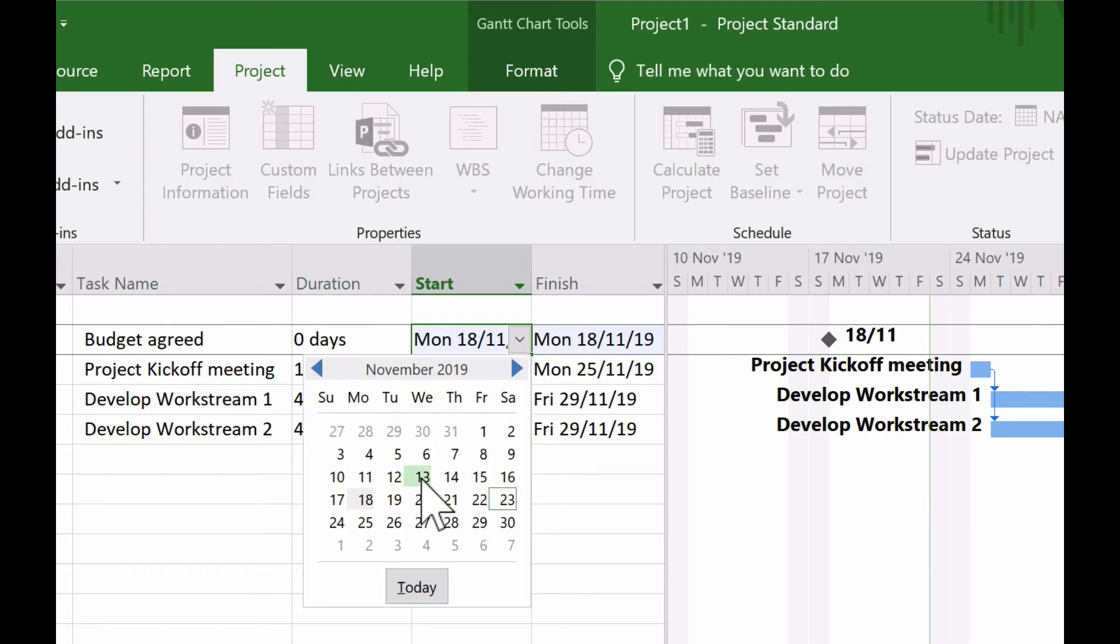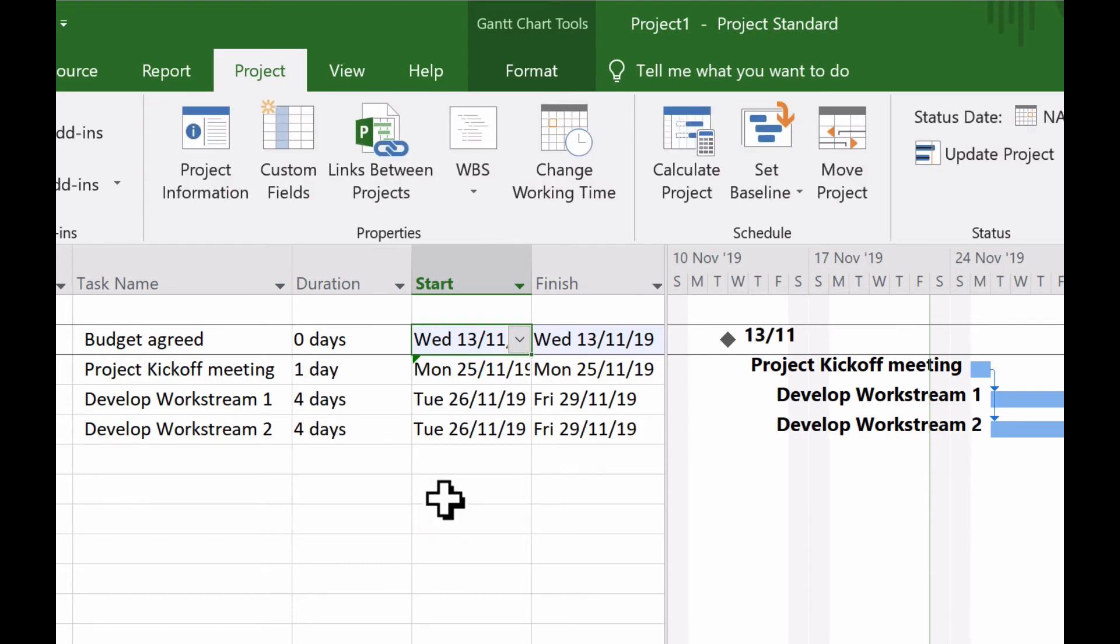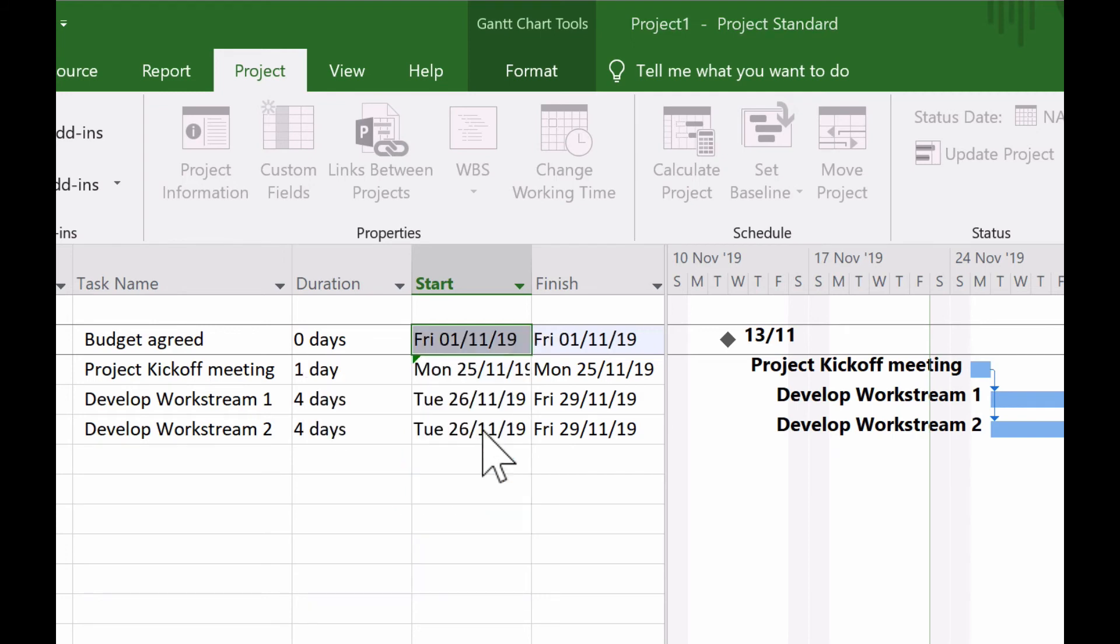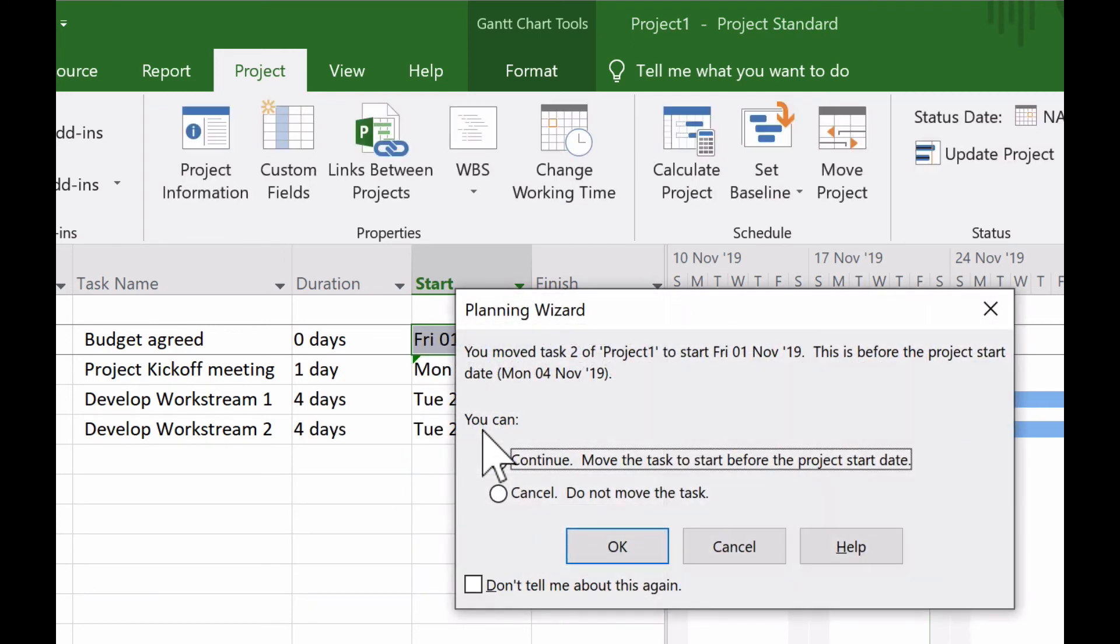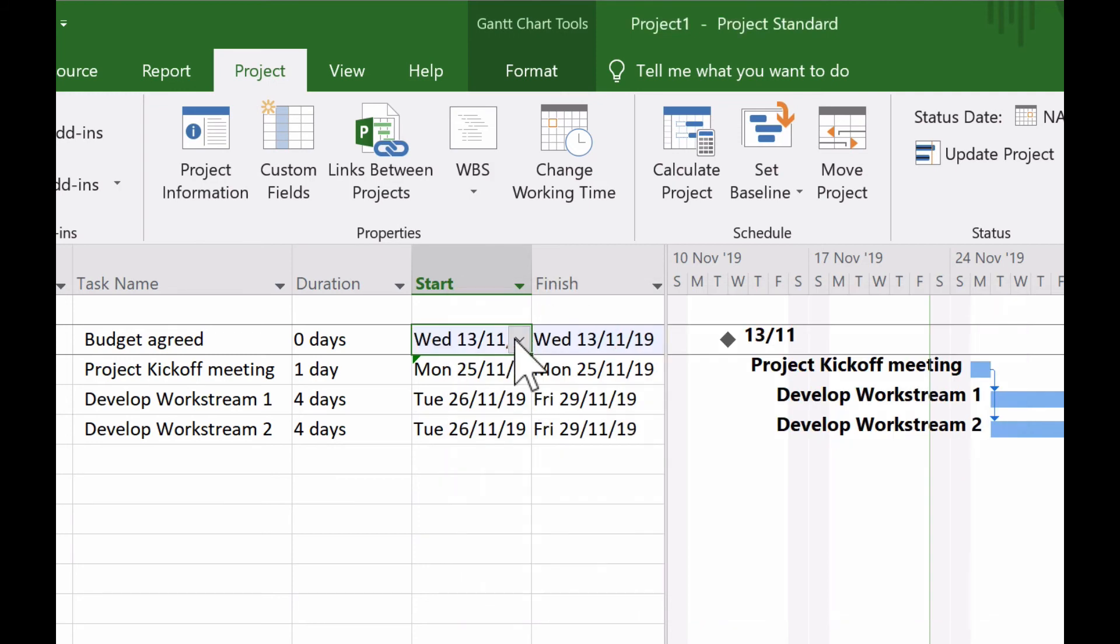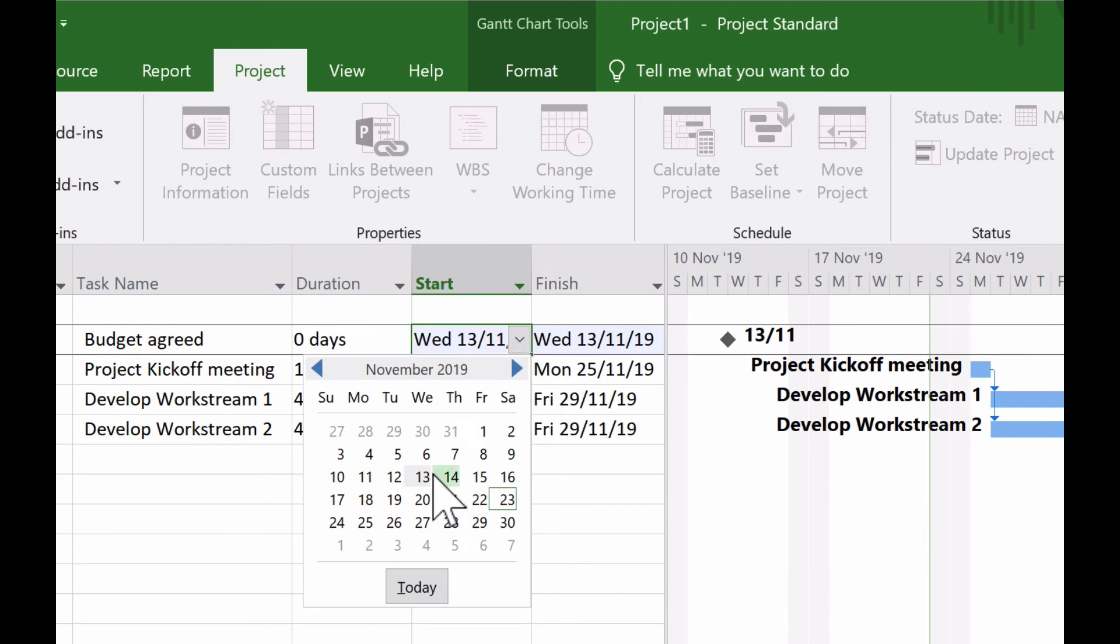Let's try something different. Let's try making it a wee bit earlier again. Again, no complaints from Microsoft Project. Now remember, we set the start date of the project to be the first Monday of the month in November. So let's try putting a task in before that date, Friday the 1st. And sure enough, we're back to getting our complaints from Microsoft again that we've inserted a task before the project start date, which however this time is telling us is the 4th of November as we manually set.